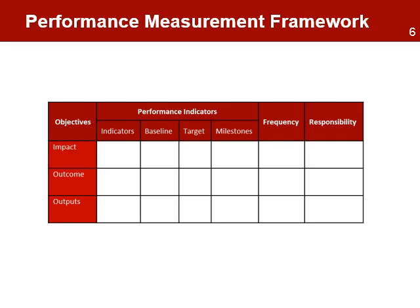The performance measurement framework adds the following elements: a baseline, a target, milestones, frequency of creating the data, and responsibilities for collecting the data.